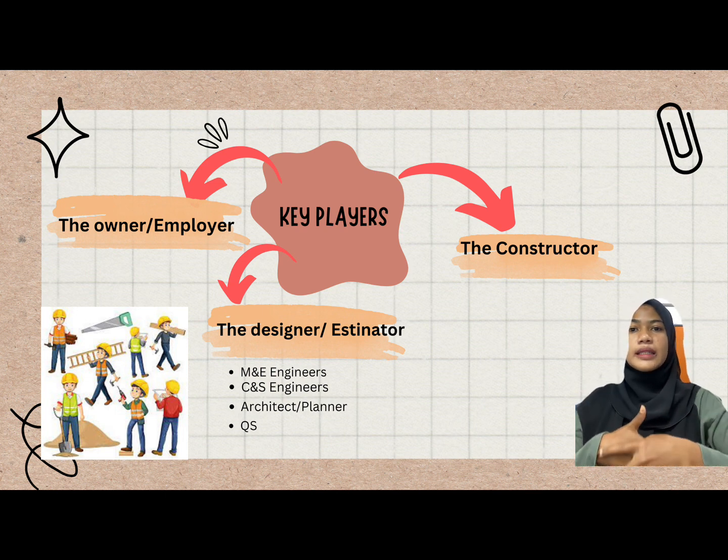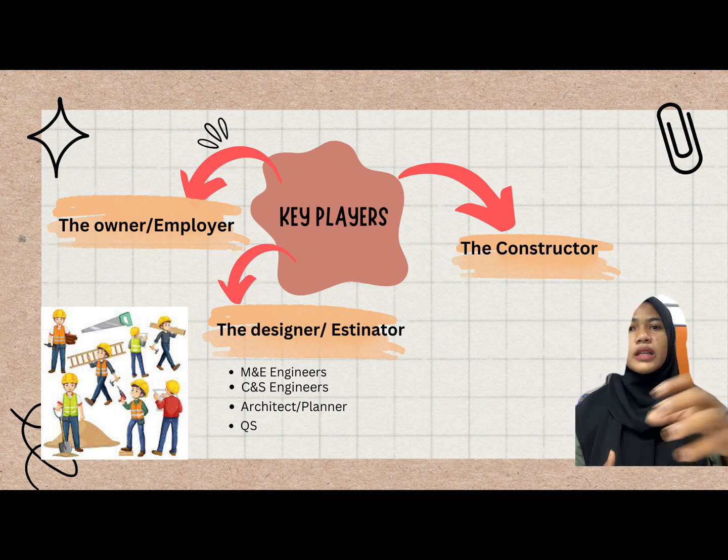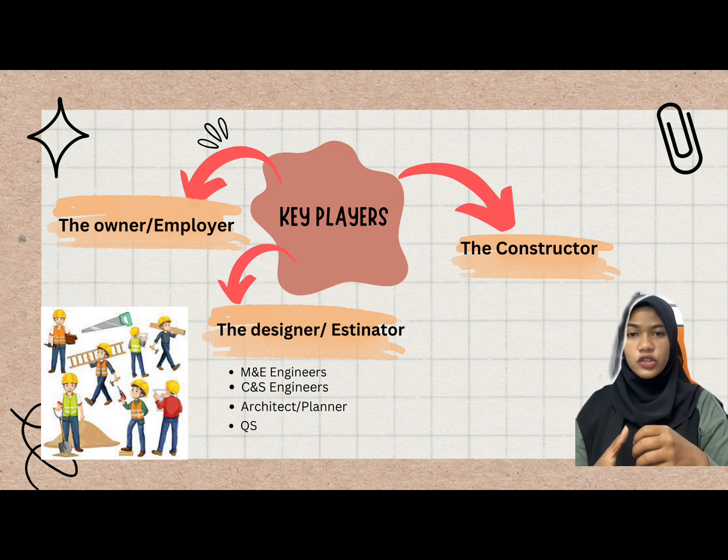According to the architects' and engineers' design, work is delivered under a contractual agreement. The main contractor will select specialist subcontractors based on their capability, availability, and price. If it is a design and build project, the contractor will direct the engineer and architect on product selection.